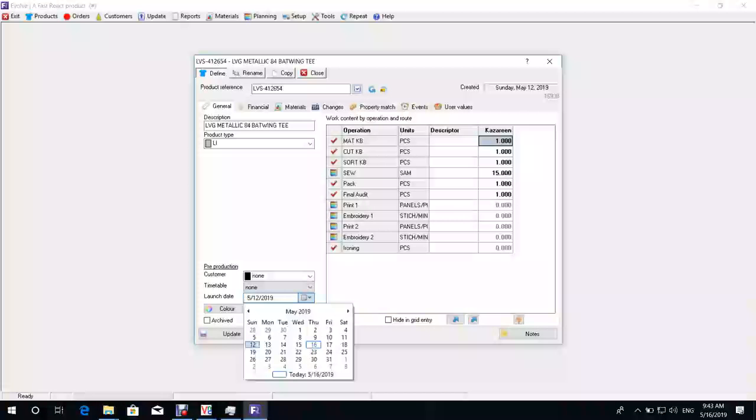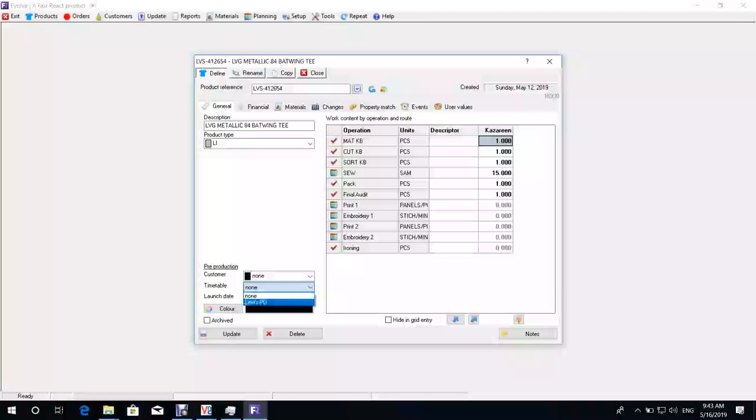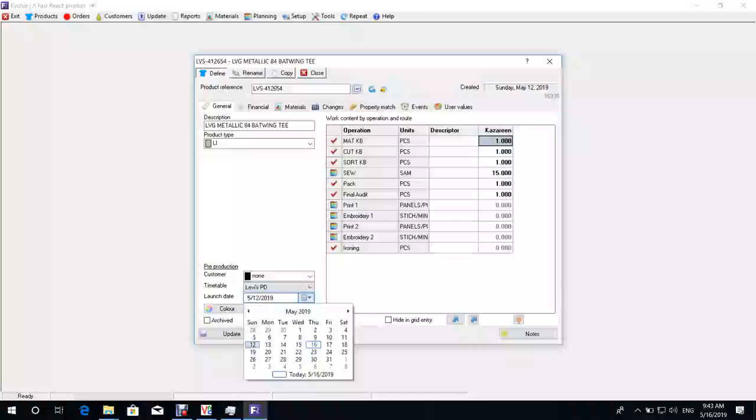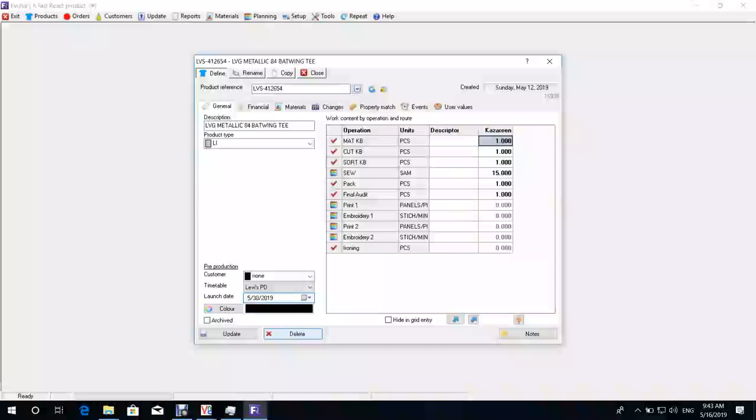Okay. And then the last thing you'd need to select is a date, an event date, what we call a launch date. This is the date that everything needs to be completed by. You need to define that, say maybe a month away from now, or in your case, one week from now. This is the date we're working towards, your initial target date. Let's say I'm going to give two weeks, because I don't trust the one week you guys say.